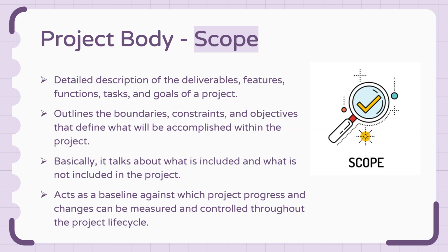जब आप project में आगे progress करेंगे, then जो भी चेंजेस करेंगे या जो भी आप कंट्रोल करेंगे, that would be whole relatable to the scope, because many a times when you work on a live project the stakeholders come ke boss you have not done this thing, then you should have your scope ke boss this is not in our scope, that we are not going to cover in this particular project, that you can take it as a request and a change request and we can go and deliver it in another project, but scope says कि ये मुझे करना है और ये नहीं करना, right?